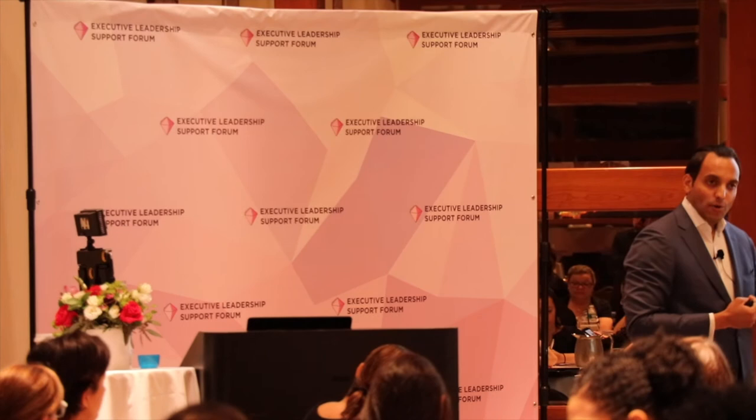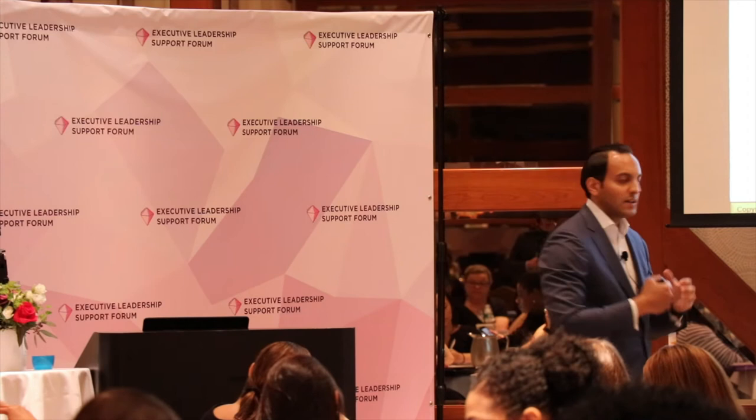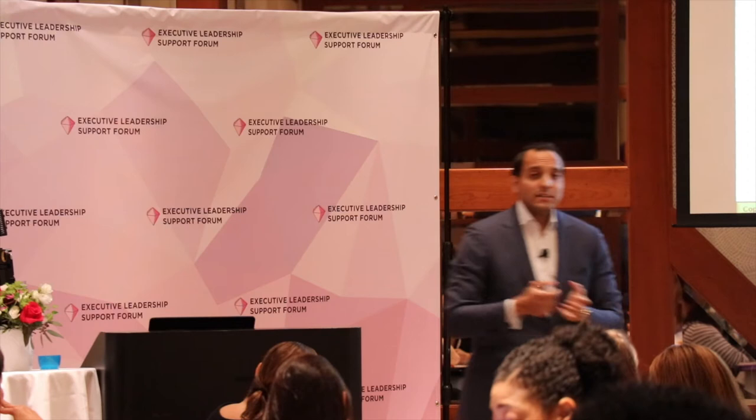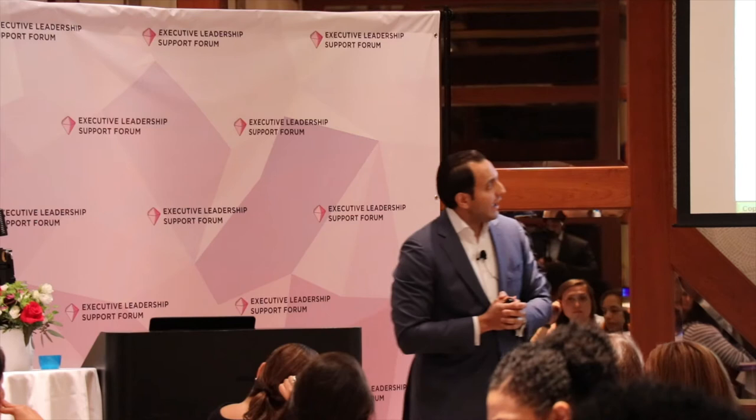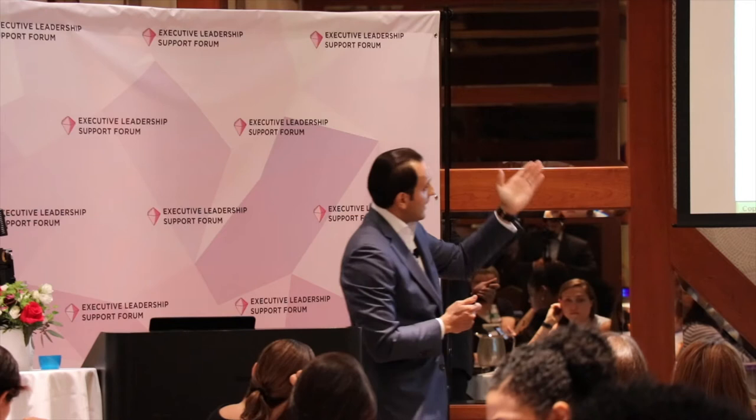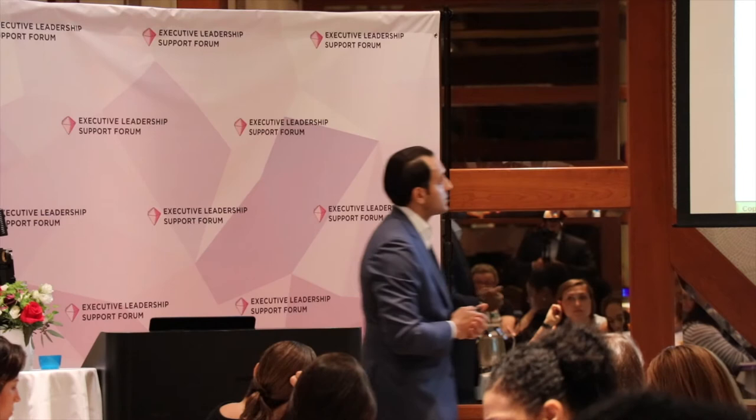If you're gonna be responsible for task planning and assigning tasks to various people who don't directly report to you, a charter is an important document that authorizes you as the project manager heading up this initiative. It includes the objectives, the success measures, what is in scope for the project, and what is out of scope. Can't tell you how many times that's gonna save you, when they say, well, this was never in scope, you can point to the charter and say that was never in scope. It has other things like the stakeholders, the assumptions and constraints, and then the high-level risks.